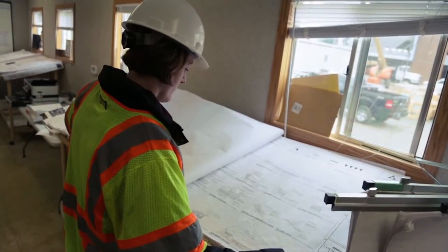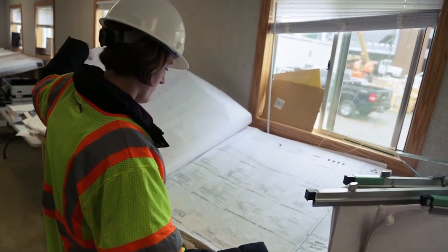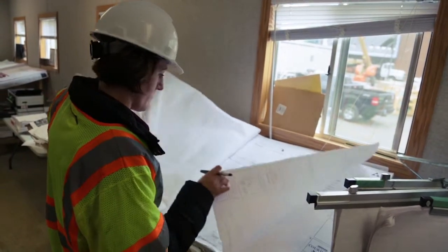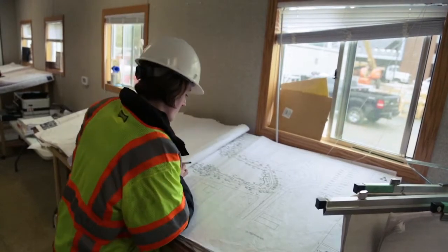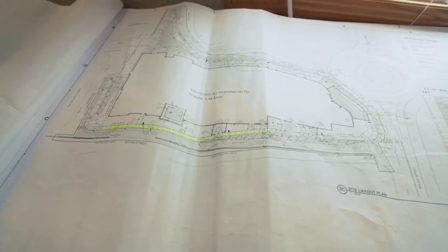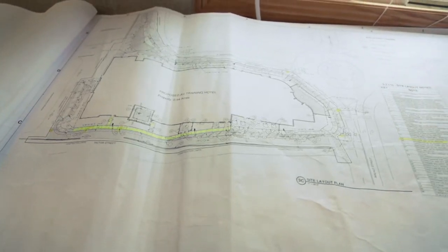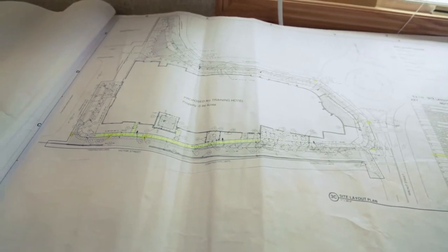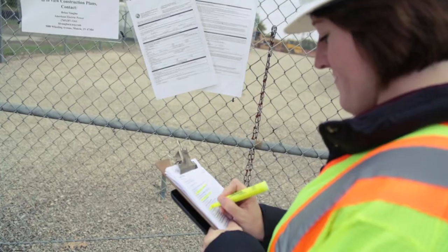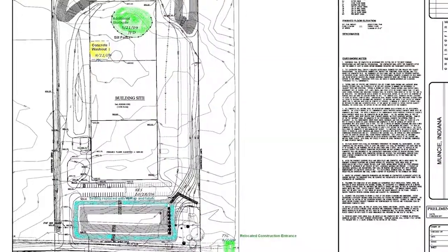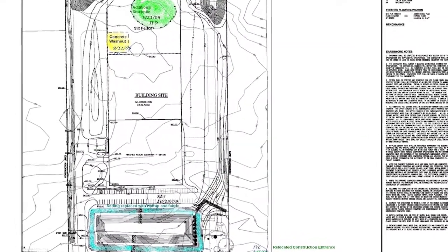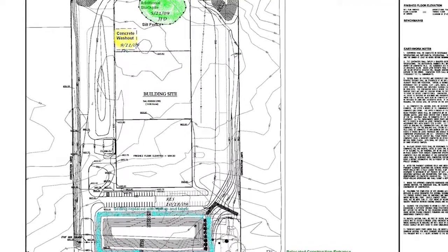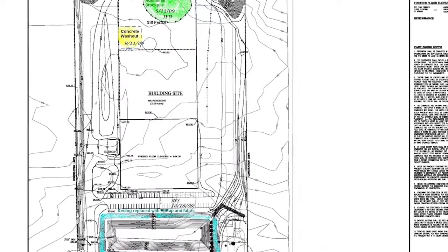Familiarize yourself with the Stormwater Pollution Prevention Plan or SWIP, outfalls, point of discharge, and best management practices or BMPs for the present stage of active construction. For example, excavation, soil export, soil import, landscaping, grading, or inactive. Keep a copy with BMPs highlighted or GPS'd. Keep in mind that the SWIP is a living document and that modifications to the plan may occur throughout the construction project, including the use of additional and/or alternative measures.